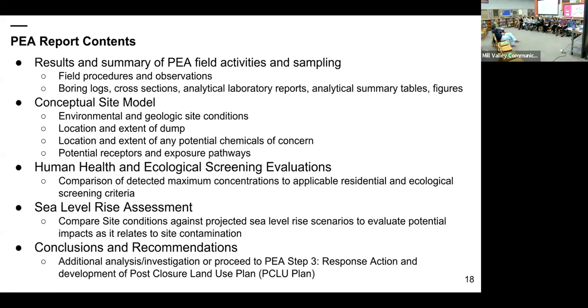Right. I think we'll take the next question. It's also from Anonymous. Did Noah Webster walk away because of the land use, or because the project was not feasible with a $33 million budget versus the lower budget that Nino was originally projecting? The $30 million was the approximate estimate to remove the entire landfill from that Noah Webster site. If the district were to sign the land use covenant, then they wouldn't be required to remove the entire landfill and it wouldn't be $30 million.